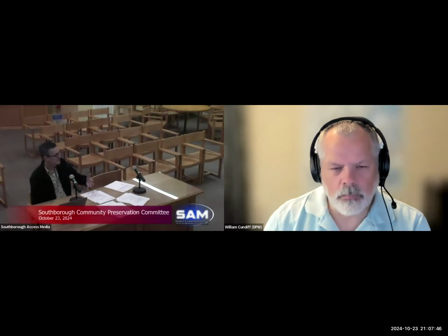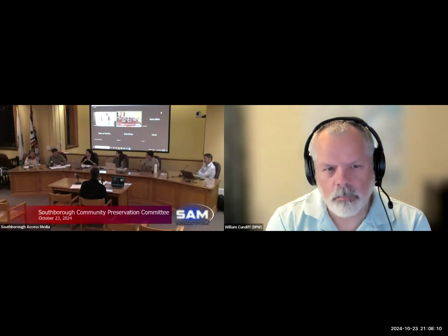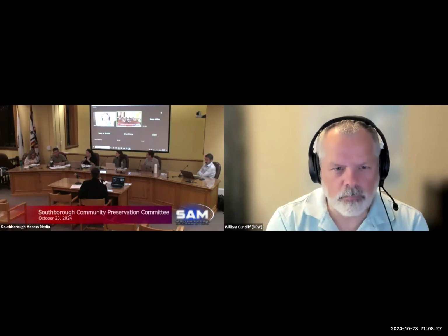And I think as the process goes along, I understood this is something that unfolds over the course of months. We can refine this a little bit better. I came in very open-minded, wanting to get your feedback. And I will say, once a refined estimate is put together, it's been our policy for several years now to always include a contingency of 10%. If you go over, you have to come talk with us before accessing that contingency. But we don't want to have a project where it's so close to the goal line and they run out of money, $4,000 short or something. So we've always included that contingency. We would presumably do that here as well.